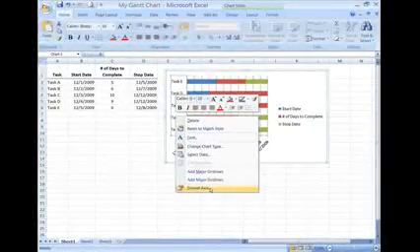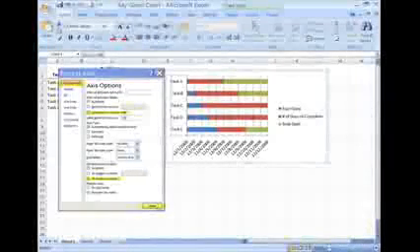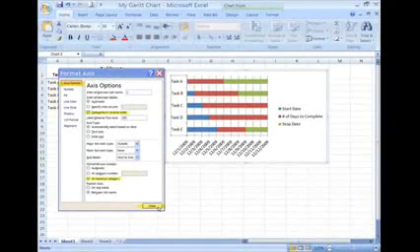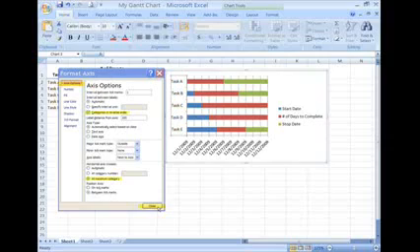Right-click on it to open the menu and click on Format Axis. The values in our chart go from E to A. We want to reverse that. In the dialog box, click inside the checkbox next to Categories in Reverse Order. Under Horizontal Axis Crosses, click in the circle next to At Maximum Category. This keeps our horizontal axis at the bottom of the chart. Finally, click the Close button.